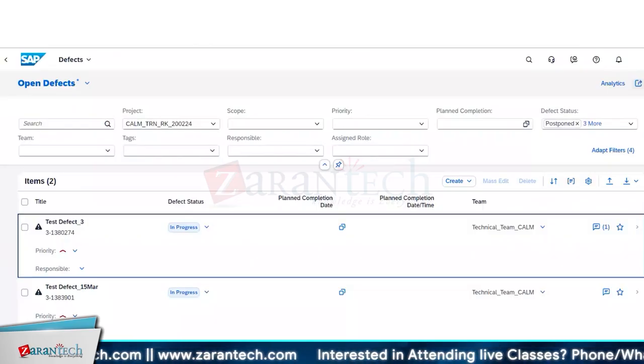From defects you can either create it as a feature, as you said, or at least link it back, a direct linkage, so there could be another tab or feature which can link back to that particular feature, and then you have that tagging, because that is important. In a normal scenario, once a defect is raised, it is going to be worked by someone, so you'll assign it to person ABC. And then you will give a transport. Usually in projects, creation of a transport or change document is with the work stream lead, so the developer will ask, please give me a transport or change document to work on.